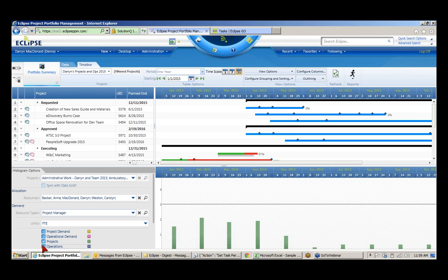But something that's often overlooked is that operational time. So keep the lights on operations, personal time off, personal development and training. You do want to track that as well to get a full picture of where people are investing their time so you can better understand where they have time available, whether or not they're at full capacity. This is where you can start to have really great discussions about, hey, we're over capacity already, we need to make adjustments. Once you've got all this information in a tool, you're going to see that there's a lot less going on in terms of stealth or shadow projects, and you're able to see it all here.